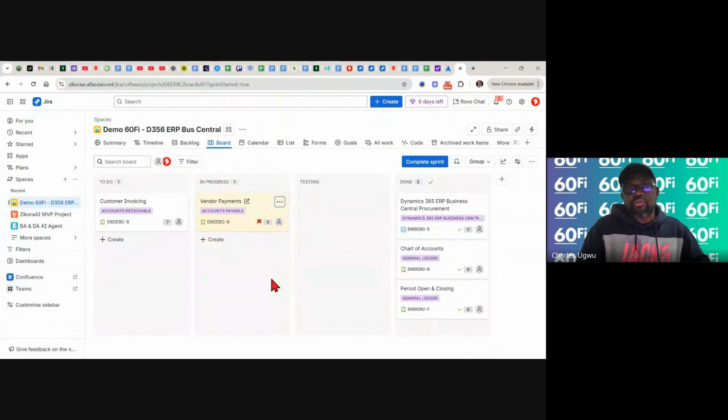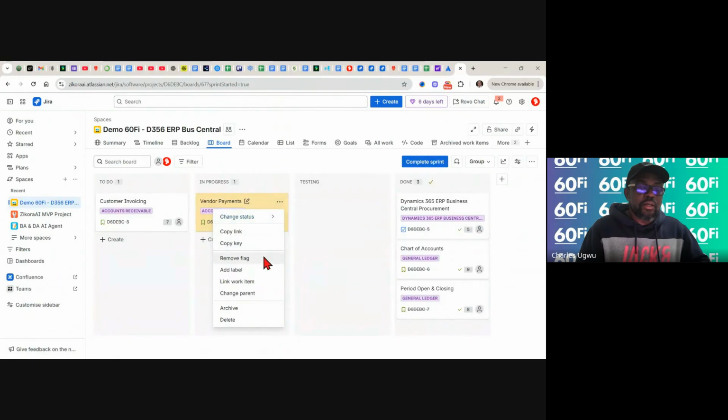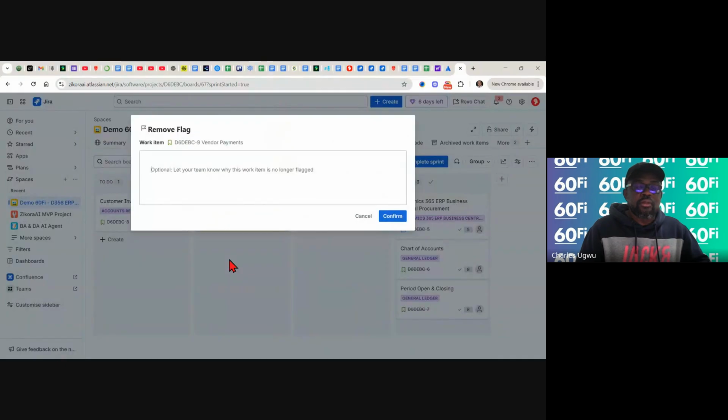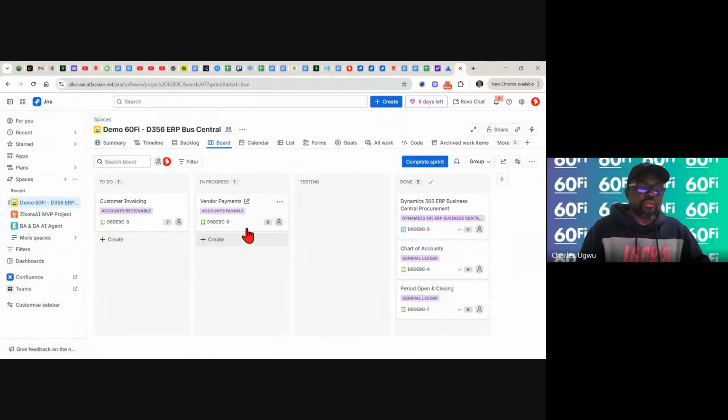That's what we say the Scrum Master is troubleshooting, unblocking the block. This is now a block. You can't work because you don't have any laptop. So you go around and get a replacement laptop so you can start your work. Once that is done, you come back, you remove the flag, confirm everything is good, and you start work again. Testing.